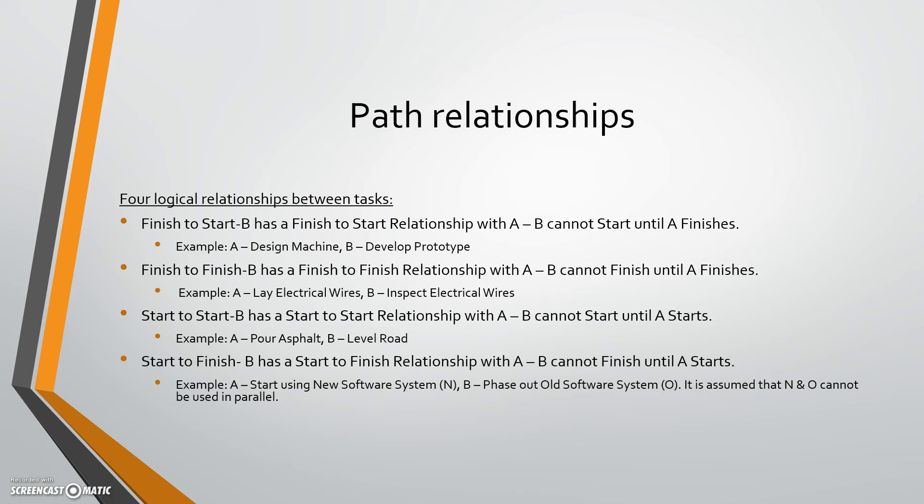With the critical path, there are four relationships I want to briefly talk about: finish-to-start, finish-to-finish, start-to-start, and start-to-finish. Finish-to-start means B cannot start before A finishes. For example, A is designing the machine and B is developing the prototype — you really cannot start developing the prototype until you have the machine designed.